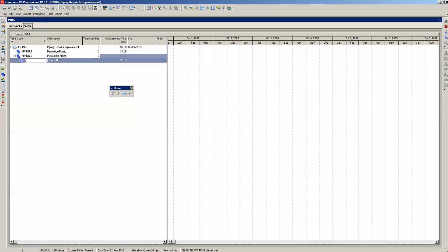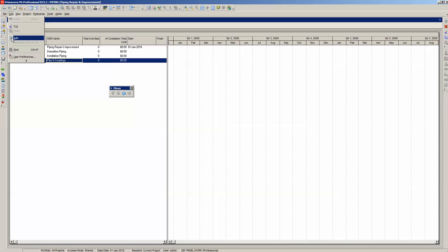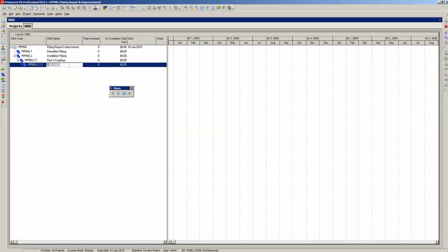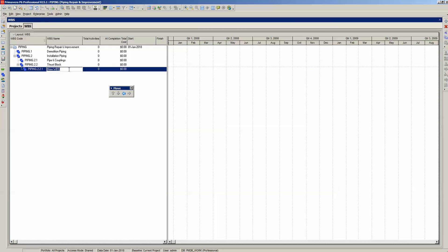Proceed by adding another WBS element and name it Pipe and Couplings. We want it to be a child of Installation Piping, so we do not need to move it. Enter another WBS element and name it Thrust Block — we need to out-dent or move Thrust Block left. Finally, add the Quality Assurance WBS element, which we out-dent twice.